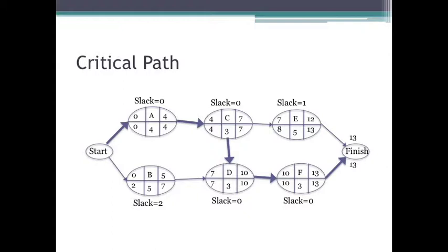Well, no, it doesn't, because those tasks already have slack. They already have extra. We don't need to give them more. So the only thing that is going to help us is to crash tasks on a critical path. And note that I say a critical path, because we may end up finding ourselves with more than one, as we shall see.